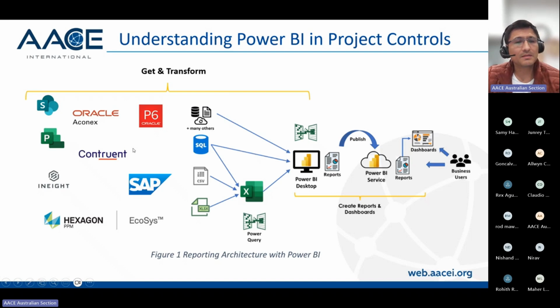The problem is that typically these tools consume snapshots of data from P6, for example. They're not connected in a live manner. So that's one of the issues with these software tools. You still have to download your P6 data and upload it manually into them if you want to do reports. So we'll consume all this data into Power BI.